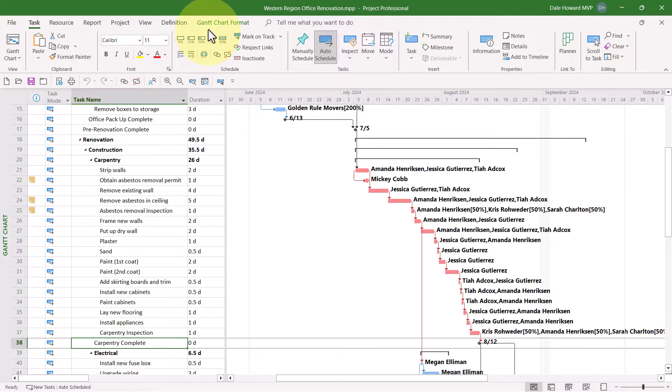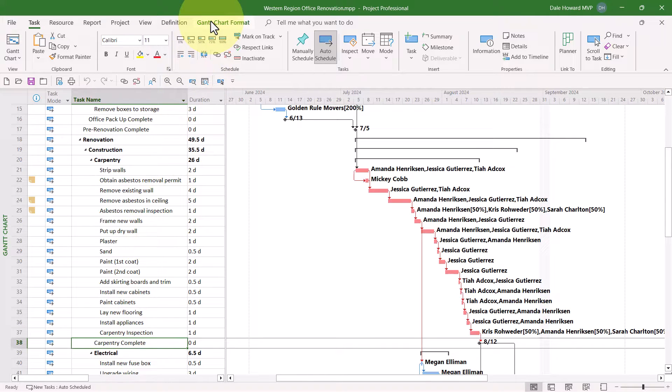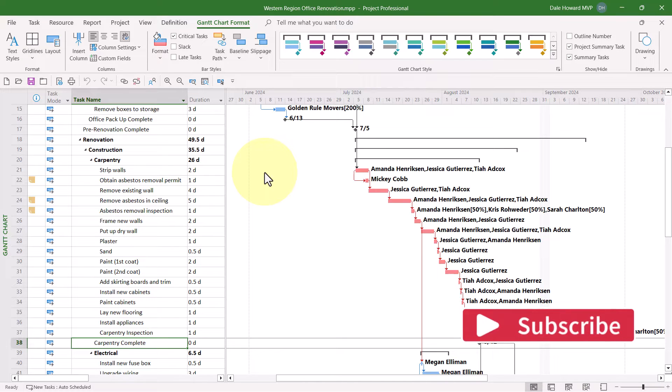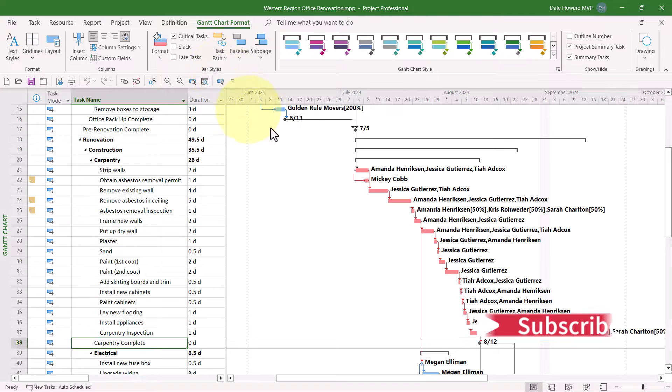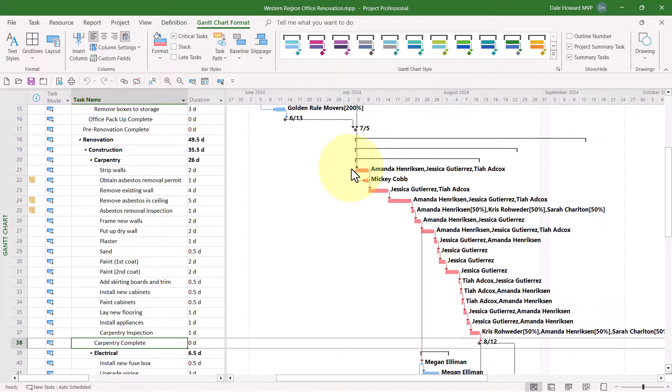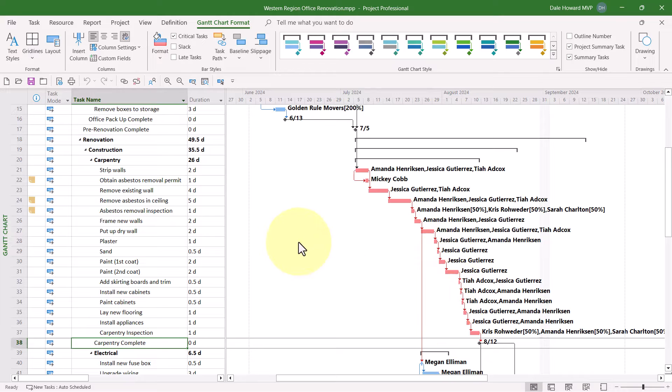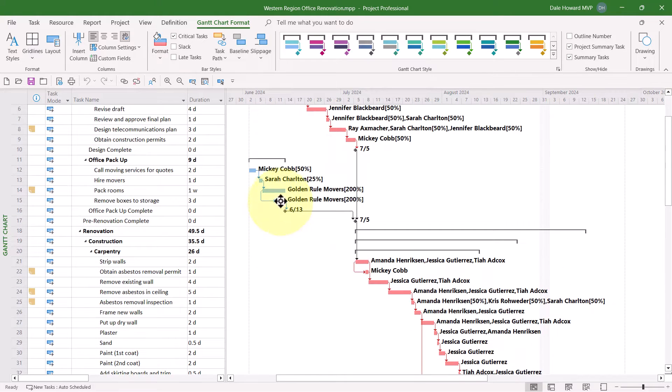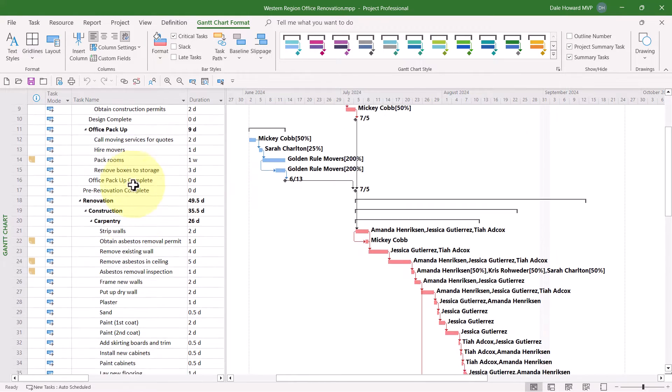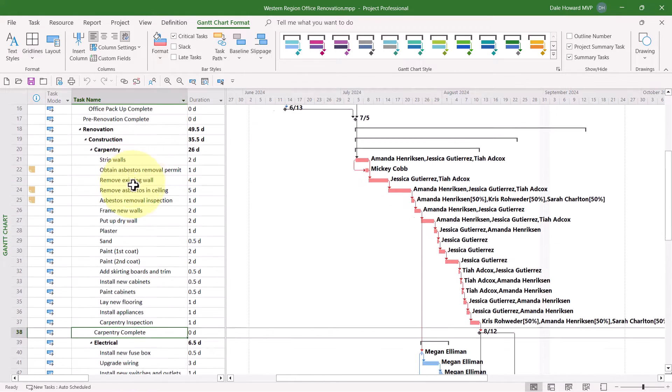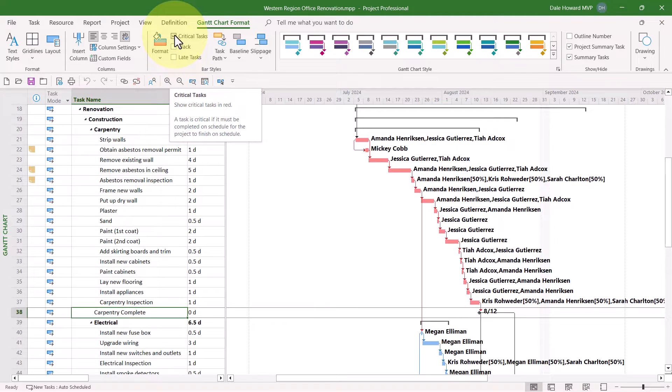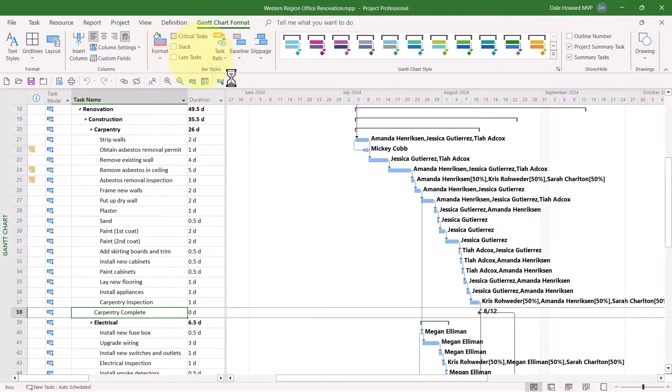Then click the Gantt Chart Format Ribbon tab to display this ribbon. If you do have the Critical Tasks option selected in the Bar Style section of the ribbon, you'll see your Critical Task Gantt Bars formatted in red and non-critical task Gantt Bars formatted in blue. I strongly recommend that you deselect the Critical Tasks checkbox to temporarily disable this feature.